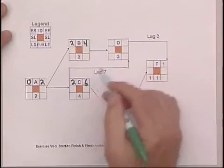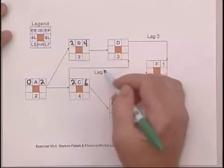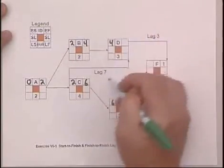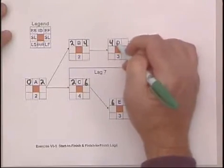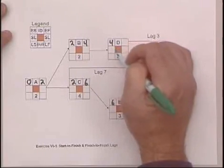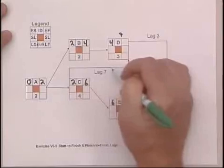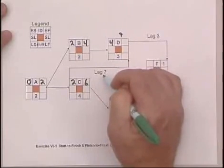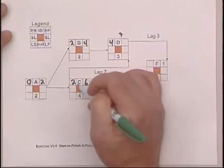And we'll stop there. Now we can start D as soon as B is done, which is four. But for the finish of D, we have to look at not only the fact that D can start as early as the fourth day and only takes three days, which is seven, but we have to honor this lag that seven days after the start of C, D can finish.